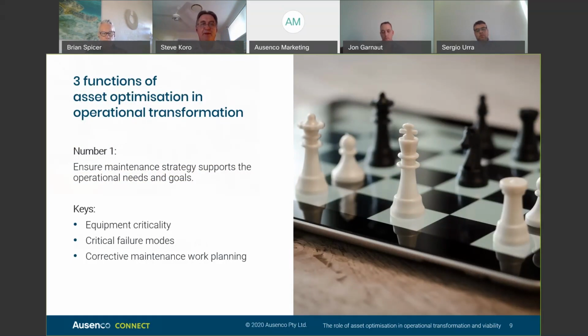There's pressure on budgets, cutting budgets. There's situations where people cannot get to sites, where maintenance personnel cannot get to sites. We've seen examples where lead times of equipment and components have been blown out of the water. I'm in Queensland and we regularly ship gifts down to Melbourne. Takes 2 to 3 days to arrive. Now 3 to 4 weeks.